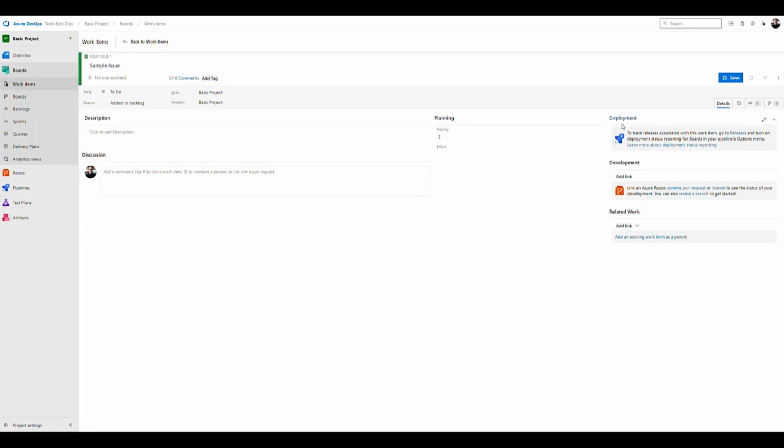So I want to showcase something important here. Let me save this first. Okay, so now you'll see the 3 states, but here's what I wanted to showcase. You have to link your items together in the hierarchical order of it. So we have an issue, but on top of the issue we have the parent object, and currently if we go here where it says add link, there's nothing.